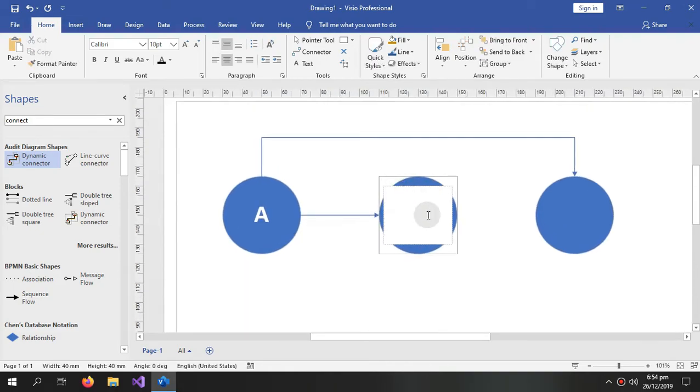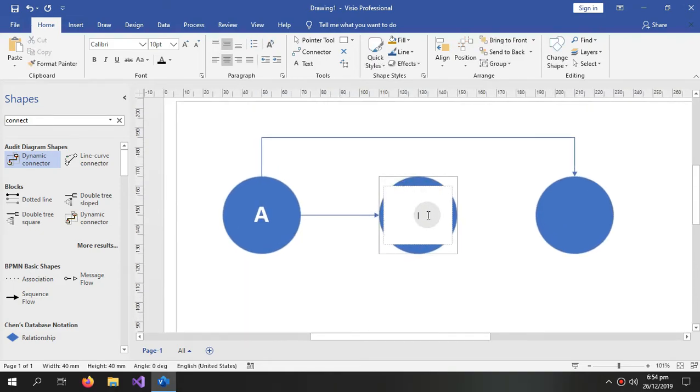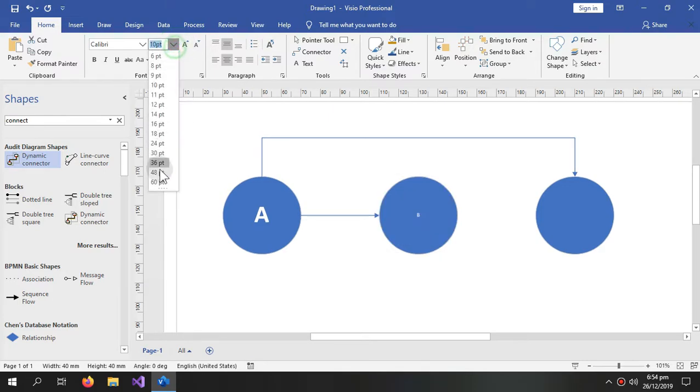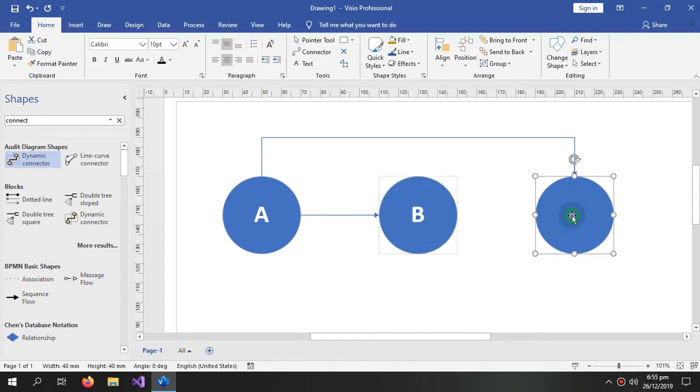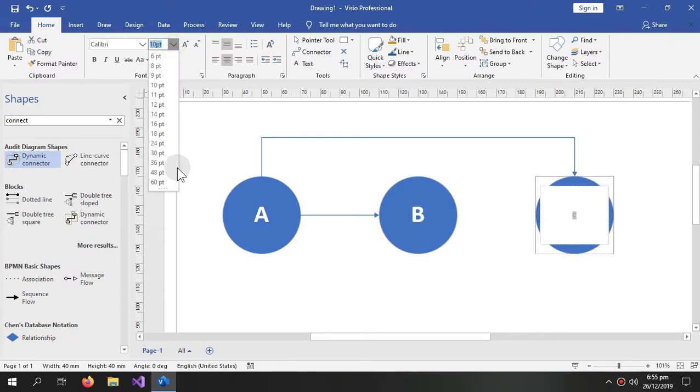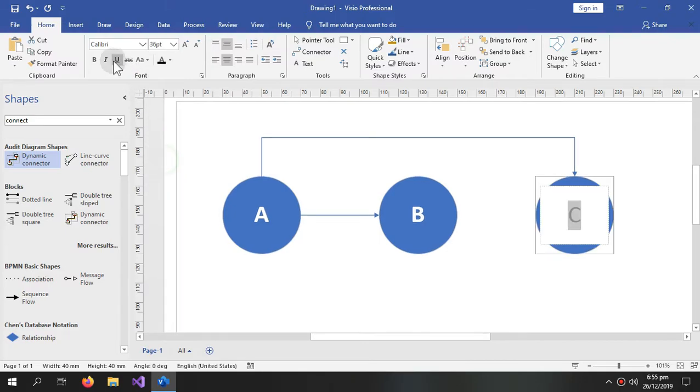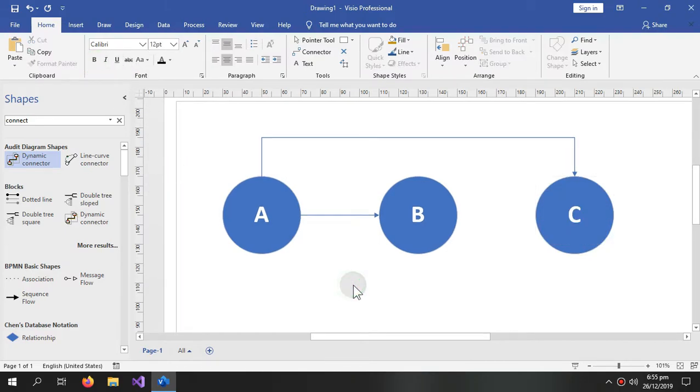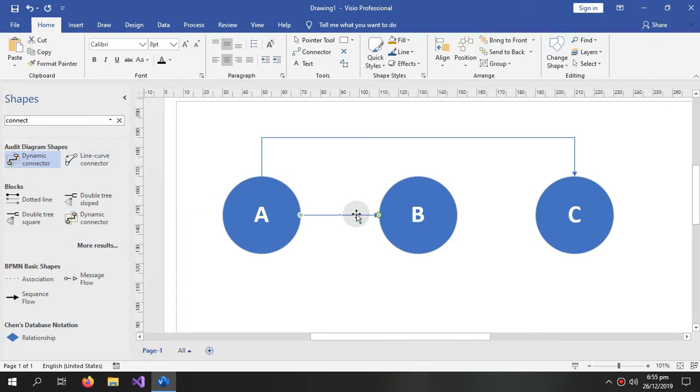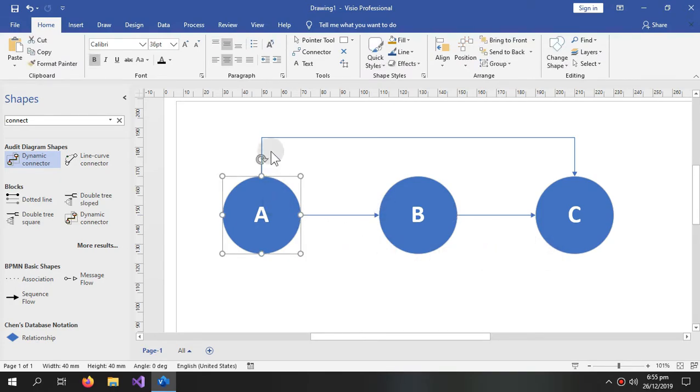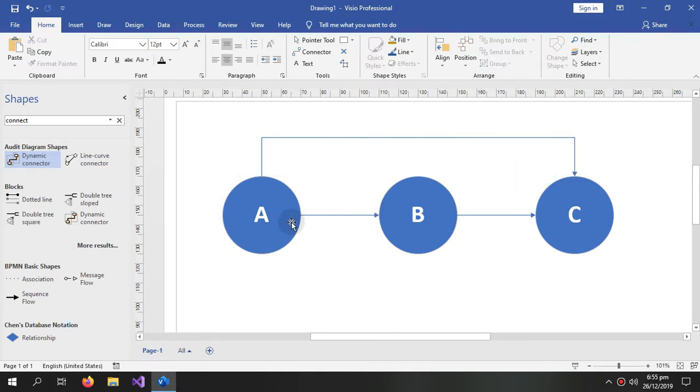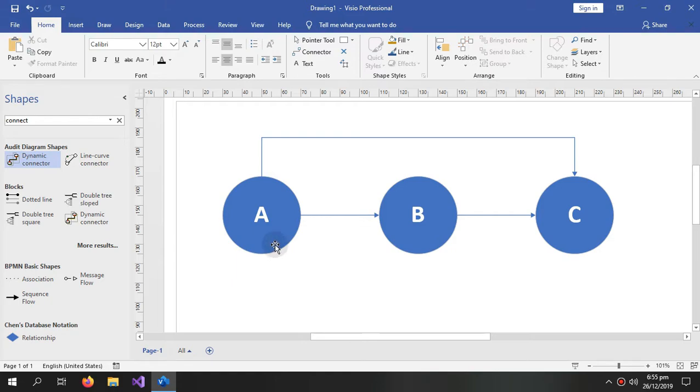And same goes for activity B and activity C. So these are my activities. Multiple arrows could be connected like this and to this point, so multiple arrows can also be connected like the A is also referring to C and it is also referring to B, so basically C has both predecessors A and B.